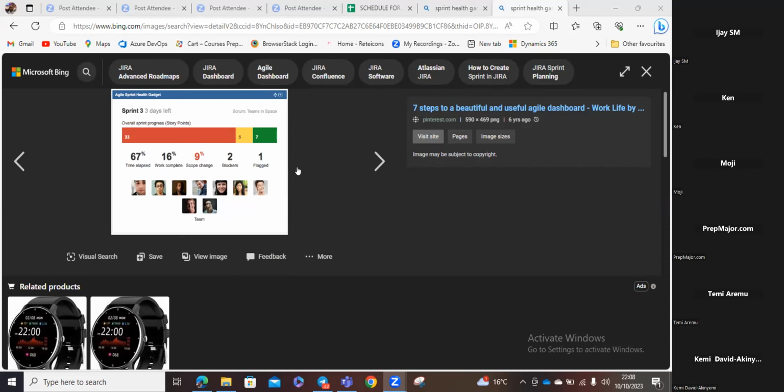Do I have the capacity to do it as a team? Do we have the technical skills to do it as a team? If we do it, is this going to affect our sprint goal? Now, if it's going to affect our goal at the end of the day, and originally your management knows that this is what people have for goal for this sprint.